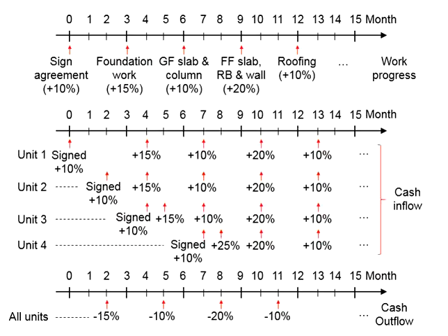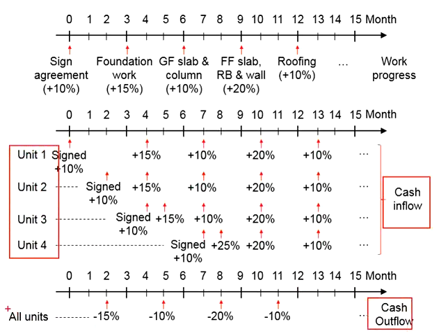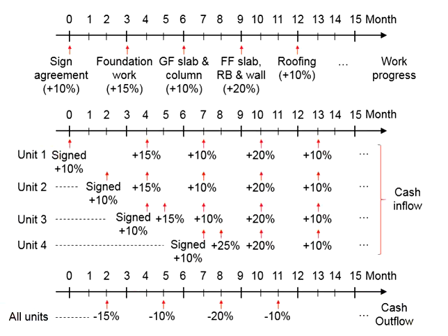Now you have 2 phases of the project. Then in your calculations of the cash outflow, you will have to separate phase 1 and phase 2 in accordance with the respective project schedule. This is the first difference between the cash inflow calculations and the cash outflow calculations, which is that the cash inflow is calculated individually, while the cash outflow is normally calculated in groups.